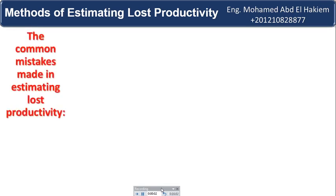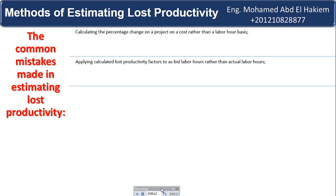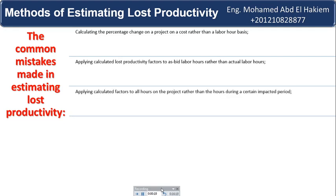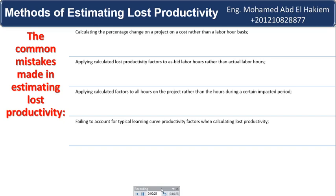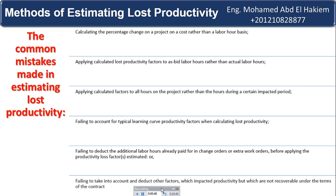Common mistakes made in estimating lost productivity include: calculating the percentage change on a project on a cost rather than a labor hour basis; applying calculated lost productivity factors to as-bid labor hours rather than actual labor hours; applying calculated factors to all hours on the project rather than only the hours during a certain impacted period; failing to account for typical learning curve productivity factors; failing to deduct the additional labor hours already paid for in change orders or extra work orders before applying productivity loss factors; and failing to take into account and deduct other factors which impacted productivity but which are not recoverable under the terms of the contract.